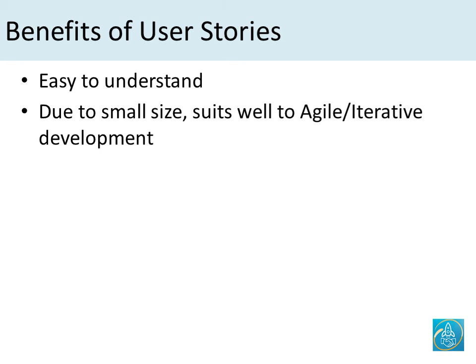User stories do a good job of driving the conversation with something that's very light to begin with, and then it drives the entire team towards a common understanding of what they're trying to build. And then user stories suit well to the agile or iterative development methodology. They are light, they can be worked upon independently, and then the development times are really short. So they suit well to 2 to 3 week sprint cycles that you generally associate with agile development.